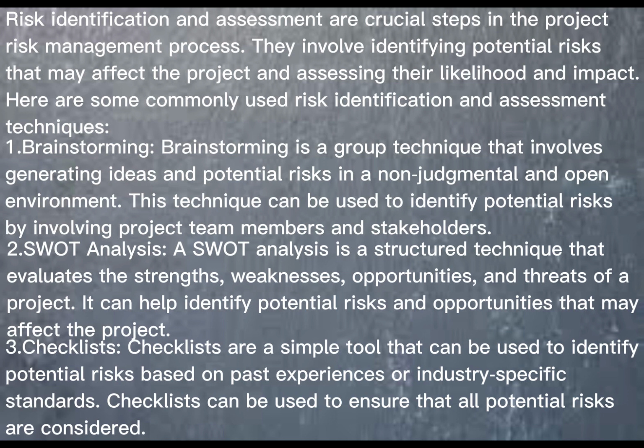1. Brainstorming. Brainstorming is a group technique that involves generating ideas and potential risks in a non-judgmental and open environment. This technique can be used to identify potential risks by involving project team members and stakeholders. 2. SWOT analysis. A SWOT analysis is a structured technique that evaluates the strengths, weaknesses, opportunities, and threats of a project. It can help identify potential risks and opportunities that may affect the project.